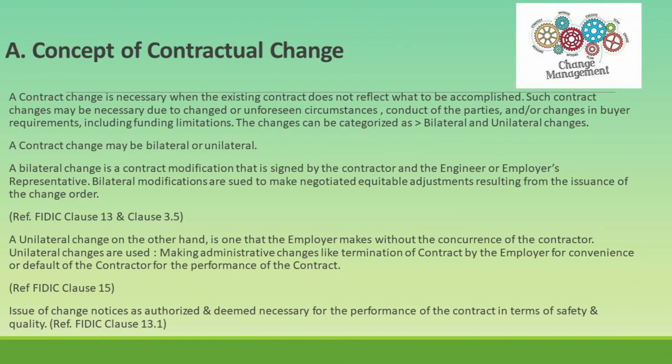Slide 2: Concept of Contractual Change. Welcome to the first part of our discussion on how to pursue claims or manage changes in EPC contracts. A contract change is necessary when the existing contract does not reflect what needs to be accomplished. Such changes may be due to unforeseen circumstances, conduct of the parties, or changes in buyer requirements, including funding limitations.